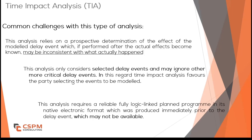Additionally, TIA focuses only on what happened just before the delay. This means it might overlook earlier events that could have also impacted the project's timeline. For instance, if multiple delays occurred earlier in the project but were not reflected in the latest update, these might be ignored in the analysis, leading to incomplete conclusions.